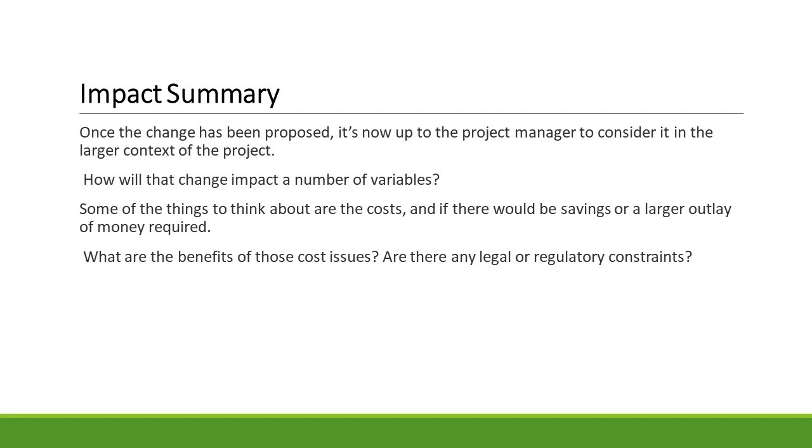So, to recap, once the change has been proposed, it's now up to the project manager to consider it in the larger context of the project. How will that change impact a number of variables? Some of the things to think about are the costs, and if there would be savings or a larger outlay of money required. What are the benefits of those cost issues?